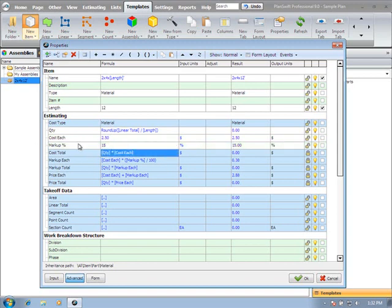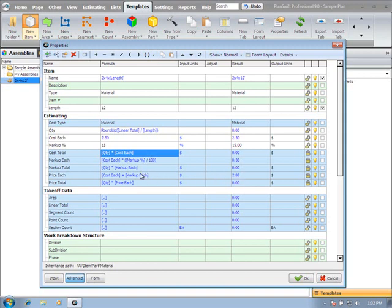Once I fill in the cost and the markup, my cost totals, my markup, my price each are all calculated fields. As you can see, they've already got their calculations built in. My price total is taking the quantity times the price each, which you can see our price each is now $2.88.